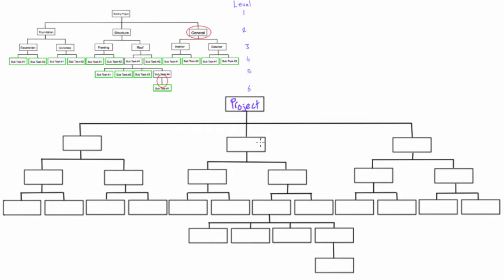Now on level two, you'll start numbering each of these elements with just a single digit. The PMI numbering system doesn't use zeros, so we'll just start with 1, 2, 3.